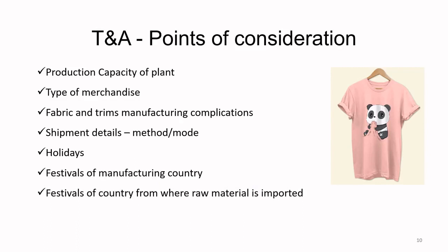Festivals of the country from where raw material is imported. So that's the example of China, the Chinese New Year. Festival of the manufacturing country. Let's say you are importing garments. Then you look at your own holidays in your country. You look at the country in which the manufacturing will be done, their festivals, and then you look at that country from where the raw material will be imported. So all of these things have to be looked into when you are a buyer, and accordingly you will gauge or evaluate the time and action calendar which has been made by the export house or the garment manufacturing company.